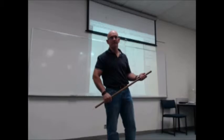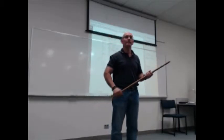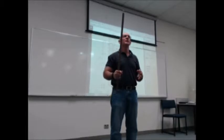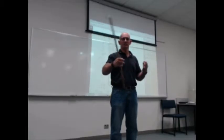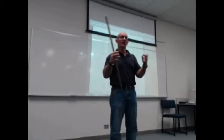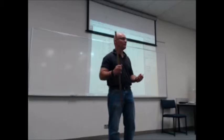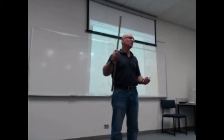I price per room. I work out how long it takes and by door. I think I get a much more accurate judge of it. Everybody has their way, but you can still do that if you're working on a typical average house of four bedrooms. Work on your room price, add it all together, same as we've been doing, divide by the square meters, and you've now got a square meter price. Simple as that. But it depends on the finish, whether it's stain, paint, aluminium windows, timber windows.